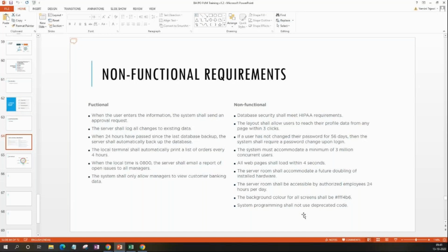Any questions? And where do we write this non-functional requirement? Non-functional requirements can be written as a separate epic itself, or you might have written different epics for various things, right? So if you see relevancy, you can add points in the same epic, else you can maintain a separate non-functional requirements epic itself, but it would be at the epic level.